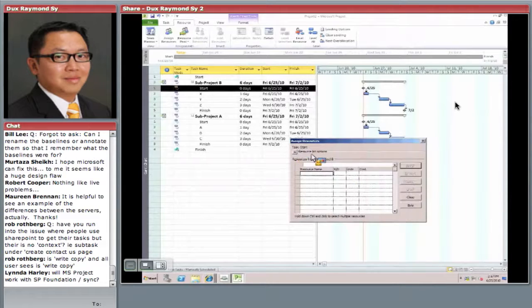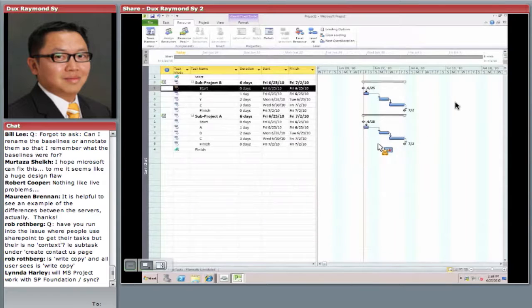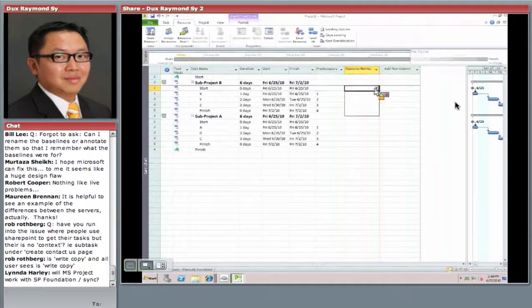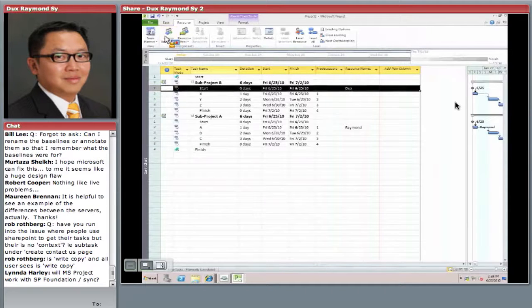for the various projects. Now, one of the things that you have to do, which, notice that it's not showing up even if I have my resources displayed, notice that it's not showing up. One of the things that you have to do is you have to go to that project file and link to where the resources are defined. So I'm just going to show you a quick example here. I'll just type the resource name, because what we could do is schedule another webcast. I'll just talk about multiple projects.